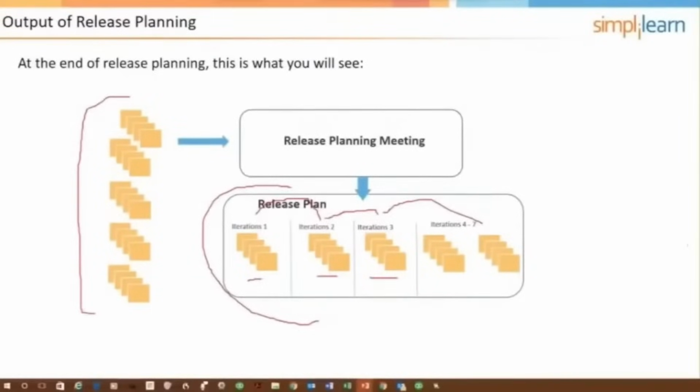It's called rolling wave planning, where we do detailed planning for things in the near term in tandem with high-level planning for things in the future. Did I say that right? Detailed planning for things in the near term in tandem with high-level planning for things in the future. And we talked about deciding as late as possible, I believe, meaning that it's better to actually plan the later releases for purposes of making sure we have the most information available.